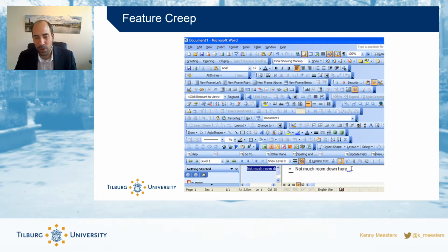As the project goes on, people will start thinking, wait a minute, this is also interesting, this is a requirement we should also add. New things will get added, new buttons, people will think about new functions they want to add, there are rediscussions, and it will not be finished. You will end up with a lot of loose buttons, which, referring to the introduction, is one of the key issues in government-run IT projects.